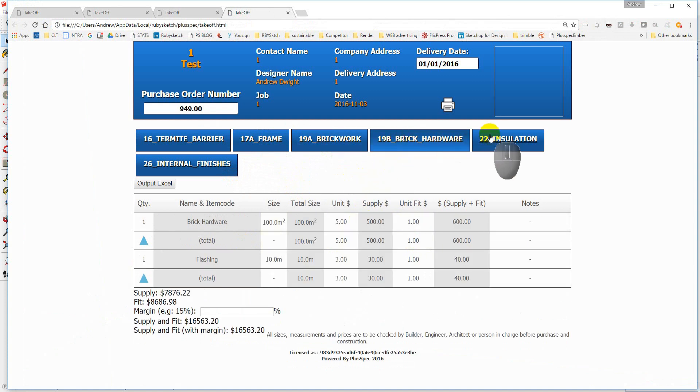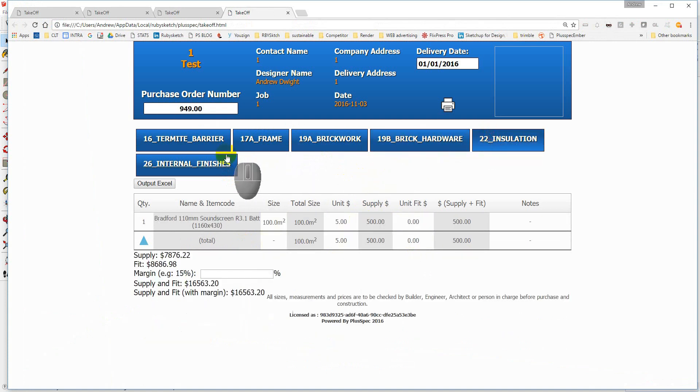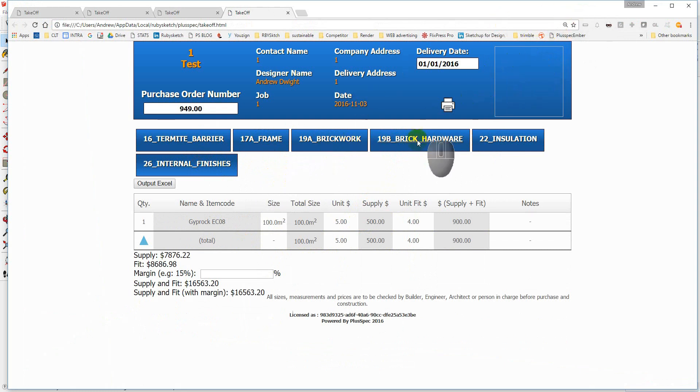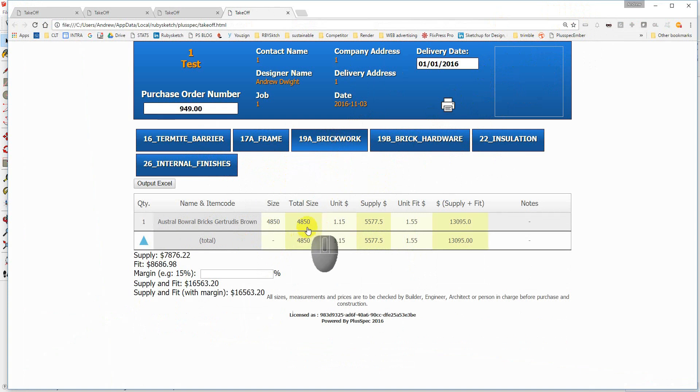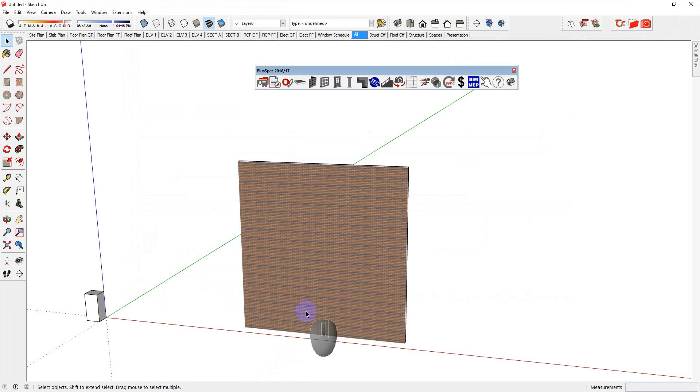And I now have a wall 10 meters long by 10 meters high. If I do a take-off, all my prices have all carried through to the next wall. And you'll notice that I have 10 linear meters of everything in my framing and everything required and a price associated with it. 4,850 bricks. Okay. When I go back and put a window in, so if we looked at our brickwork here, we have 4,850 bricks. However, we go and put in a brickwork here.